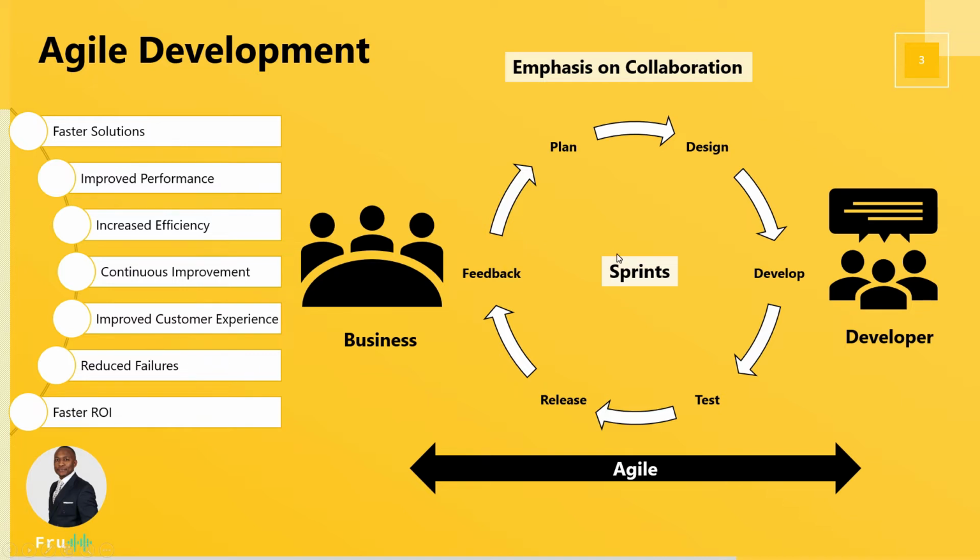But you might say, well, hasn't this been done before? And you'll be right, this has been done before. But the whole idea for Agile and what really is new about Agile, if you ask me, in my opinion, is that Agile seems to cut that cycle down to a very short period. As a matter of fact, usually it's 2 weeks that is recommended. So within a space of 2 weeks, the teams are planning, they're designing, they're building something, they're giving that to the business for feedback within a 2 weeks period.